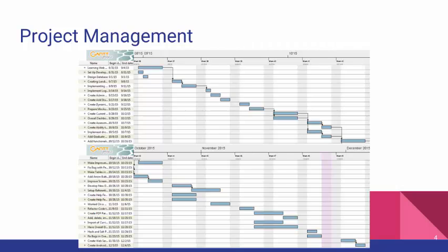Shown on this slide is the Gantt chart, split into two pieces to improve visibility. What this shows is the mapping of certain tasks to days in a semester when they were worked on. For the management of this project, we used the Scrum development method. Scrum is a development method that is broken up into sprints. For our project, each sprint was 2 weeks long, which is reflected in the Gantt chart below.